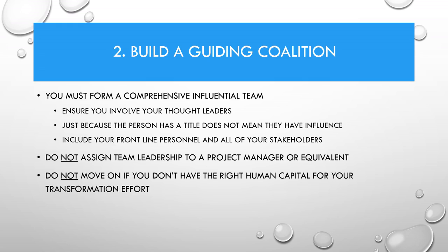And then at this step, it becomes very tempting, because we're all tight on time, to promote someone into the project leader position, right? You place them there and you say, you lead this. This is great for your promotion. You do this project. It will almost inevitably fail if you do that. You must stay involved. If this isn't truly an important issue to you, you cannot assign it to, what I see happen a lot is the chief QA resident. No, that will not go well. It is better that you stay involved as the formal leader than assigning your project to a project manager type role. All right. So get your human capital before you move on.